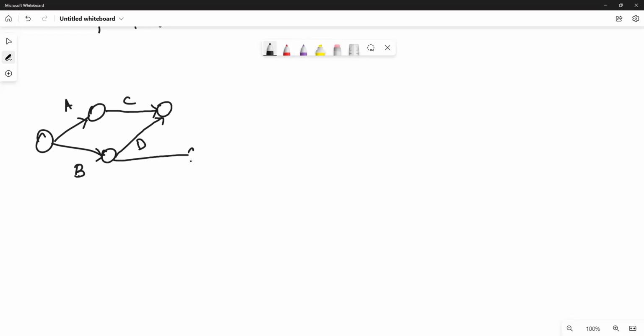E is there in the predecessor column, but it is alone. It is not combining with anything. So I can draw this. F is after CD, so I have combined CD in a single node. From that node, the activity F starts. And G is after E. It is the ending node. We cannot have more than one ending node, so I am going to merge it with this. G is after E.